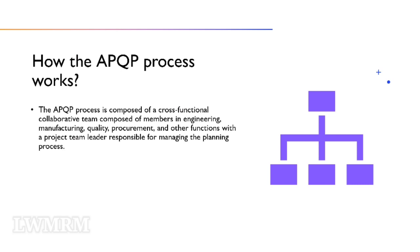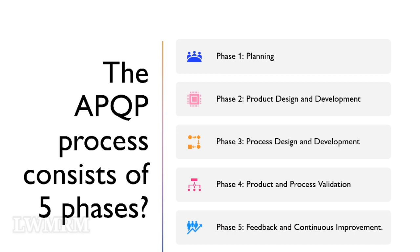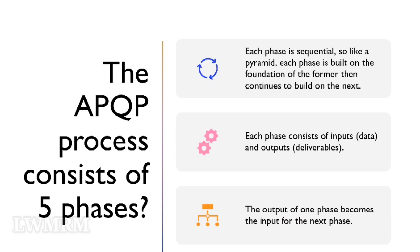The APQP process is composed of a cross-functional collaborative team composed of members in engineering, manufacturing, quality, procurement, and other functions, with a project team leader responsible for managing the planning process. The APQP process consists of five phases: Phase 1 — Planning; Phase 2 — Product Design and Development; Phase 3 — Process Design and Development; Phase 4 — Product and Process Validation; Phase 5 — Feedback and Continuous Improvement. Each phase is sequential, like a pyramid — each phase is built on the foundation of the former, then continues to build on the next. Each phase consists of inputs (data) and outputs (deliverables). The output of one phase becomes the input for the next phase.